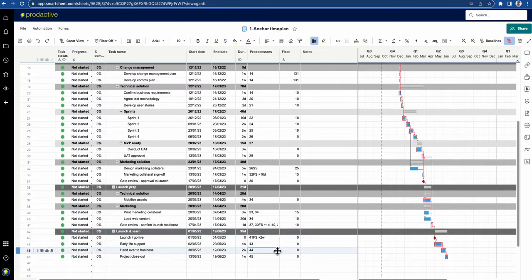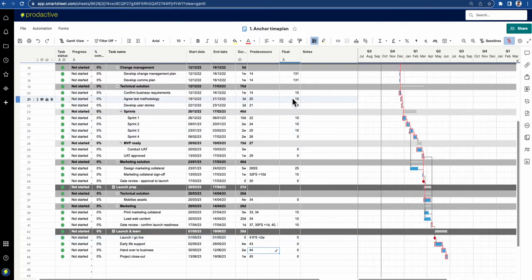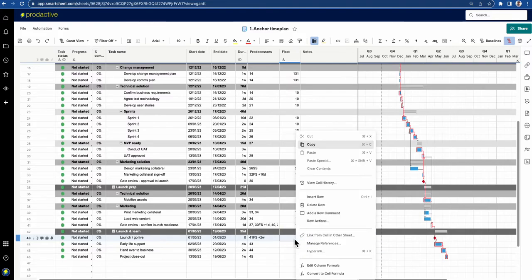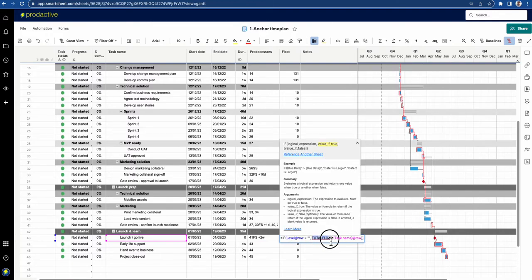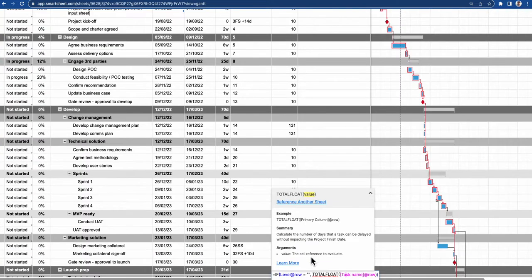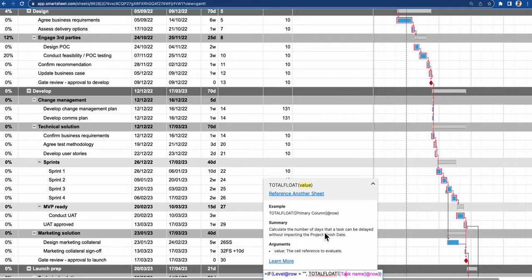Another interesting feature that Smartsheet added in February 2022 is float. This is a formula — let me unlock this and convert to a cell formula so you can see what's in here. It's called total float, and what it does is it calculates the number of days that a task can be delayed without impacting the project finish date.